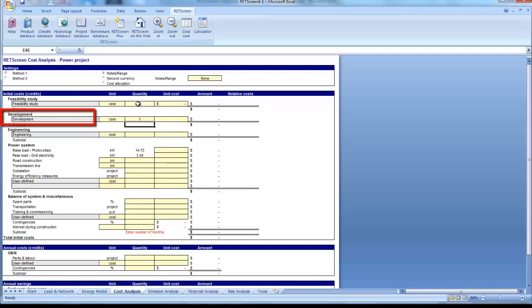The 2005 Sierra Club PV permit fee report for residential projects recommended a fixed fee of no more than $300, as this enables cost recovery for a city that has expertise in processing permits. The 2009 Sierra Club report shows $325 for residential PV project permitting fees in Southern California. Thus, we will assume a combined development fee of $1,000 to factor in potential permitting costs and labor.